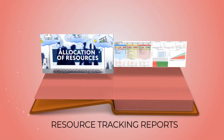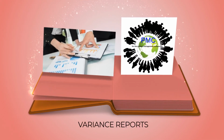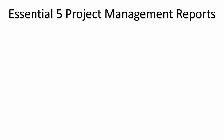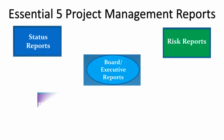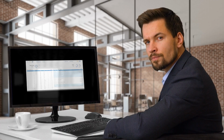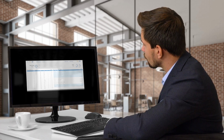The most common type of project report, and the one that is likely to be generated most often, are status reports. These reports can be produced weekly or monthly, depending on the project and the sponsor's requirement. They can also be requested on a daily basis. The frequency depends on where the project is at a certain point and how much there is to say. There's not much point reporting daily if the tasks all take over a week, as there won't be any progress to report from day to day.